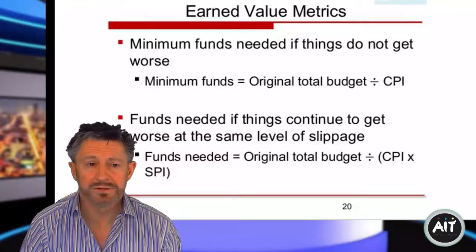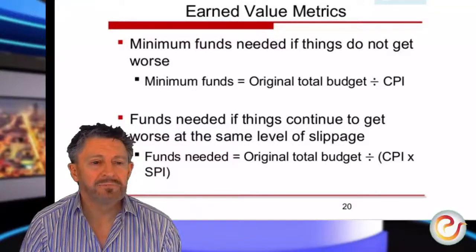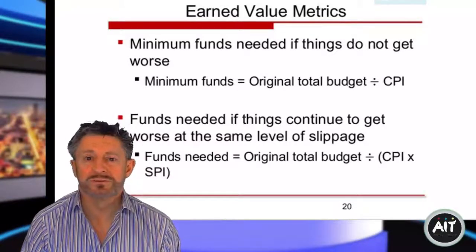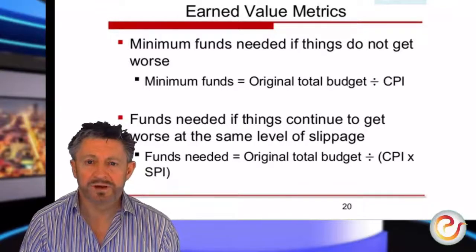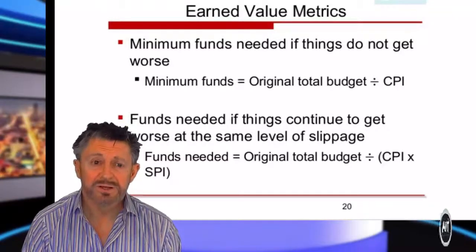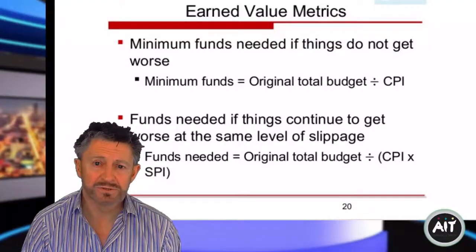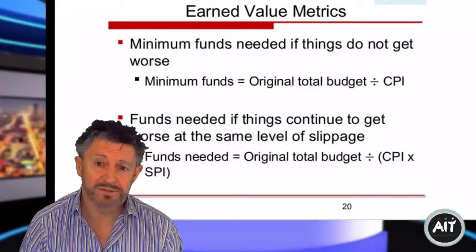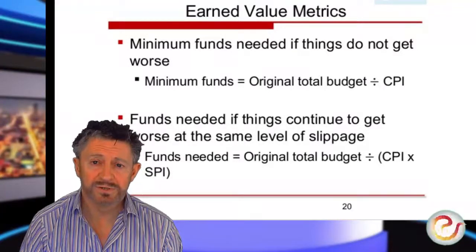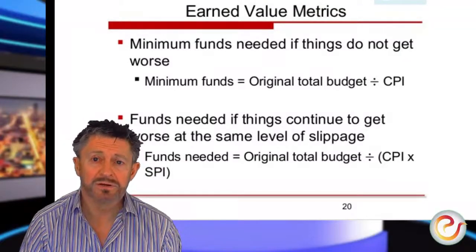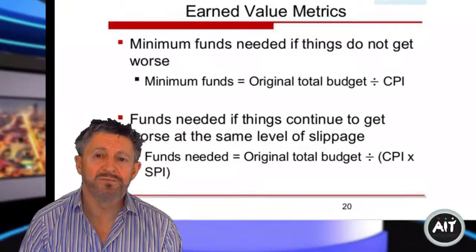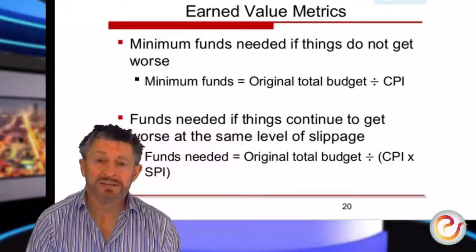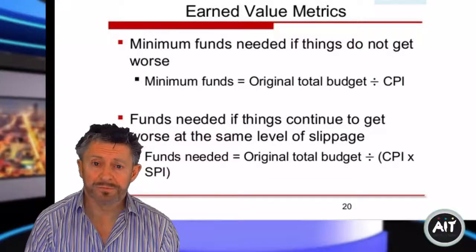I'm not great at mental maths. I am actually, but I can't remember. So you have right now, 6 weeks into a 4-month project, which should have cost me 150,000 euros. My cost performance index shows me that I'm over budget, and the index is 0.95 or 95%. So if I keep going at the moment, by the due date in 4 months' time, I will have to spend a further 5% on top of my original cost to get all the work done, if I look at it purely from a cost.